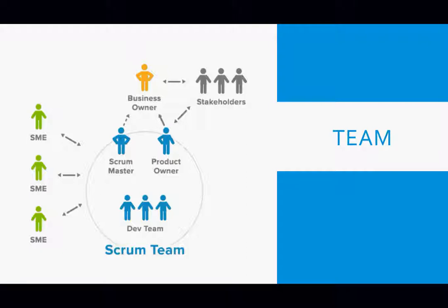But another thing I found when you are doing that is that some people are vocal, and some people with more experience will always take the day. For instance, if you meet someone at work who has been there for 8 years and you have been there for just 1 or 2 days, and the person says this item is going to take 5 points, I bet you will just align and say, yeah, 5 points, because you think you don't know the application that well. If John, who has been there for 8 years, says 5 points, you want to say, oh, it's 5 points. John said that. Because of that, some people favor the approach of using a poker series.